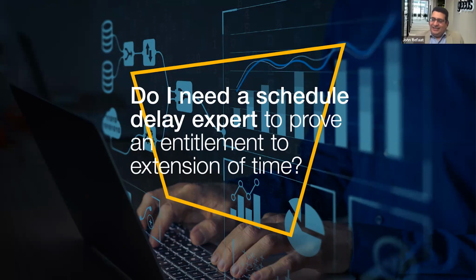Actually, I'm in agreement with Alex, but despite that, a schedule delay expert's existence is not mandated to prove an entitlement to an extension of time. However, to be fair to the delay expert, to provide a relevant and credible delay analysis, it is crucial that the most appropriate approach is adopted. And if there is no clear delay analysis method stated within the contract, the delay expert's existence helps in identifying the events that occurred, considering certain issues such as concurrent delay, pacing delays, delay mitigation, acceleration, etc., and selecting the appropriate delay analysis approach to be adopted in this case.